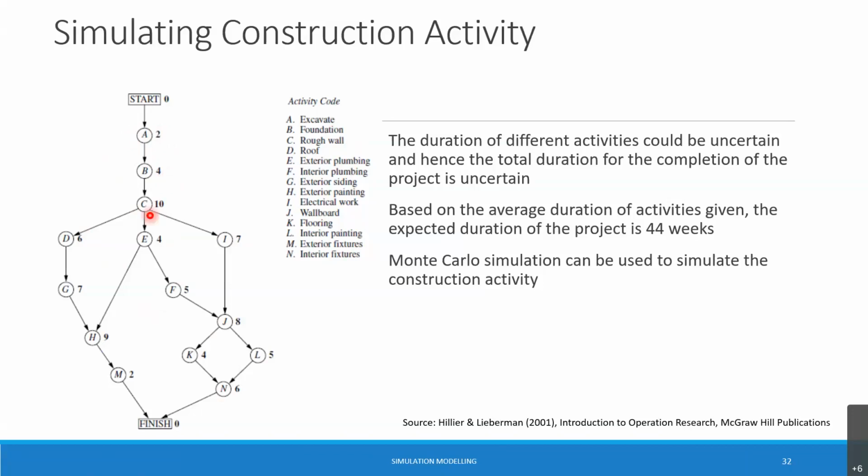So like this, based on the past analysis of data and past experience, I try to understand the probability distribution of all these activities. Now I can perform a simulation, where I write down the activities from start to finish, along different paths, and then generate random numbers to generate the duration of these different activities. Here I have to generate random numbers of normal distribution with the given parameters, and then like that create different scenarios.